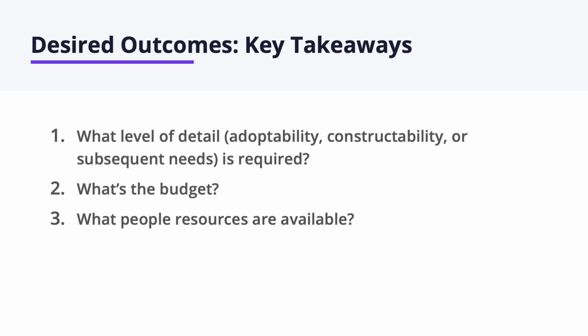If you want the consultants to do your printing and your agendas and the setup for the public meeting, that needs to be clearly aligned in the scope. Because you do have to think to yourself, do you want them charging that time to a specific budget? Or do you have the staff resource to do that? Do you want your team in-house doing the graphics and some of the modeling or things like that? Or should that be given to a consultant? Those are things you have to think through based on who you've got working for you.